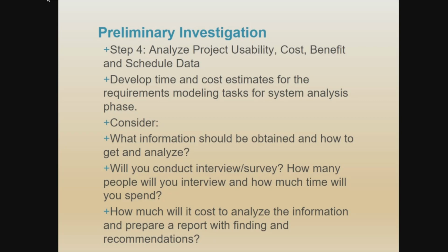Step number 4, analyze project usability, cost, benefit, and schedule data. Develop time and cost estimates for the requirement modeling task of the system analysis phase. Consider what information should be obtained and how to get it analyzed. Will you conduct interviews or surveys?